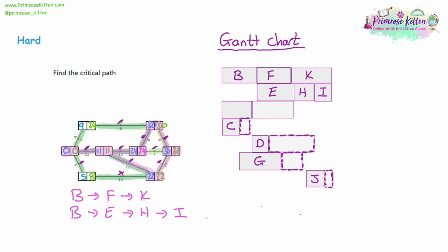So the critical path is at the top, and then we have all the tasks that are not critical and have optional room where they could start a little bit later if you needed them to. And then you can see all the ways they fit together. So how many lines are here? 1, 2, 3, 4, 5, 6, 7. You could do this with 7 employees, but you can see gaps, we can fit them together and use fewer than 7 people to do all the tasks.